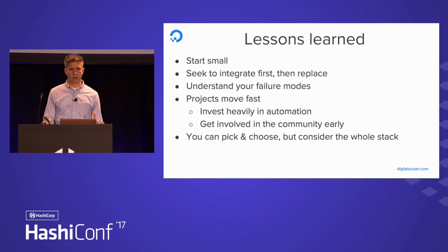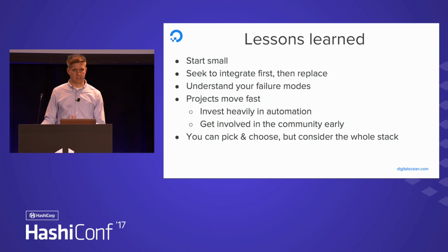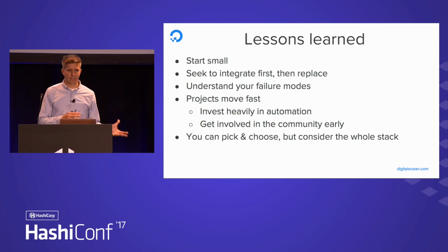But get some early quick wins and prove out that the tool is actually doing the job you thought it would, and then go from there. If you're someone with existing infrastructure and you're looking to bring in a tool to replace an existing tool, what I would recommend you do first is you look at integrating rather than wholesale replacing. I've not seen wholesale replacements go really well. It's kind of like rewrites, they don't tend to go that well.